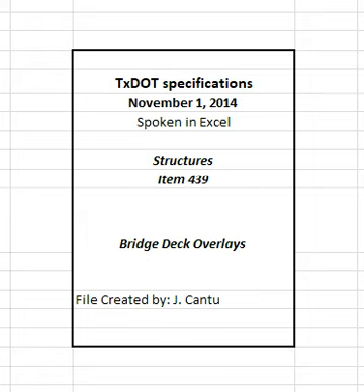7. Payment. The work performed and materials furnished in accordance with this item and measured as provided under measurement will be paid for at the unit price bid for concrete overlay, reinforced concrete overlay, and latex modified concrete overlay of the specified depth or for multi-layer polymer overlay. Payment for concrete overlay or latex modified concrete overlay is full compensation for cleaning surface, furnishing and placing grout, cleaning and restoration of reinforcing steel, furnishing and placing reinforcing steel, and furnishing, placing, finishing, and curing the concrete overlay.